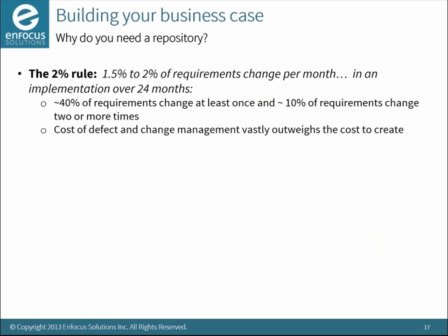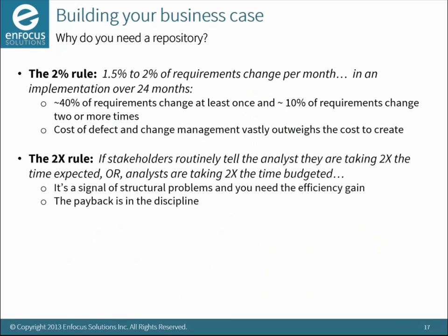If the cost of defect and change management vastly outweighs the cost to create, you need to move to a repository. All right. So any project that's over a certain size, you should be considering this, because what will happen is you say, wow, it costs you when you're doing it on paper. It's very difficult to manage change. When you're in a repository, it's a very significant thing.